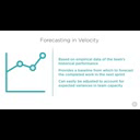During the next sprint, we'll look at the actual number of complexity points completed by the team, and we'll use that as our guide for the amount of work to load into that sprint.